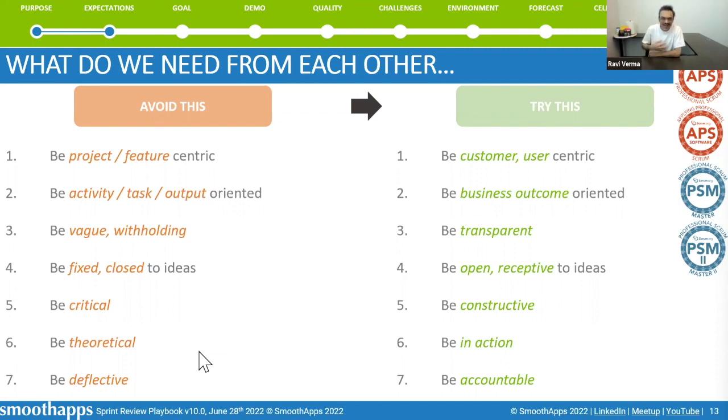So if someone says, I have an opinion, my intuition is telling me that this is good for our customers, tie it back to the customer, tie it back to the product goal. What's your hypothesis? Can we work with you offline to design a short controlled experiment to validate and figure out the smallest amount of time or money that we can spend to come back with validated learning? Maybe it's usability testing, maybe it's a survey. As opposed to, no, that's a horrible idea, or yes, let's do it, perhaps there's a third way. What might be the shortest, least expensive experiment that we might conduct to test your hypothesis and come back with validated learning? That could be a third way, perhaps.